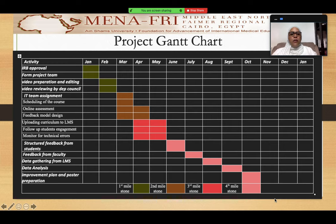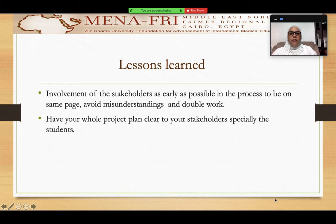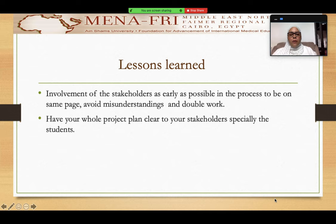We will also come up with an improvement plan for the project. So far, we've completed the second and third milestone in this project, and we already have some improvement plan that will be implemented with the next year's students, inshallah. The lessons learned in this project are that I have to involve the stakeholders as early as possible in the process, in order for them to be on the same page and to avoid misunderstanding and double work — especially with my colleagues in the department.